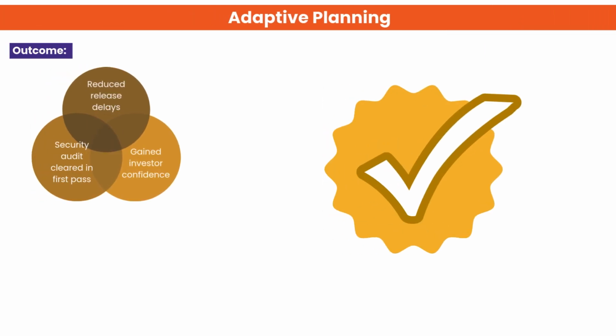Agile adaptive planning helps teams manage risk within the backlog. Risks are incorporated as spike stories, acceptance criteria, and mitigation tasks. Teams prioritize backlog items based on risk severity and urgency. Higher-risk items may be scheduled earlier, for example, a major security feature taking priority over minor UI fixes.